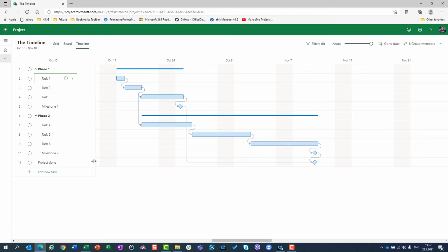The second thing is, let's say that I see that my task 3 has 3 days duration, but I don't need 3 days, I need 4. What can I do? I can go here, you will see those double arrows, click on it and just go right. Okay? Now it's 4 days, but for this task I don't need 6 days, I need 5 days. Okay, I will go to 5 days and I will have 5 days.